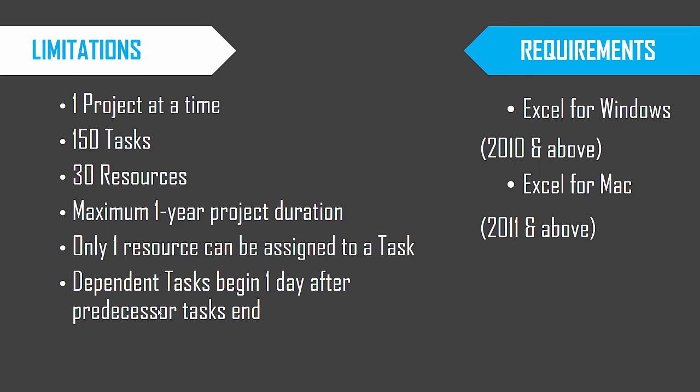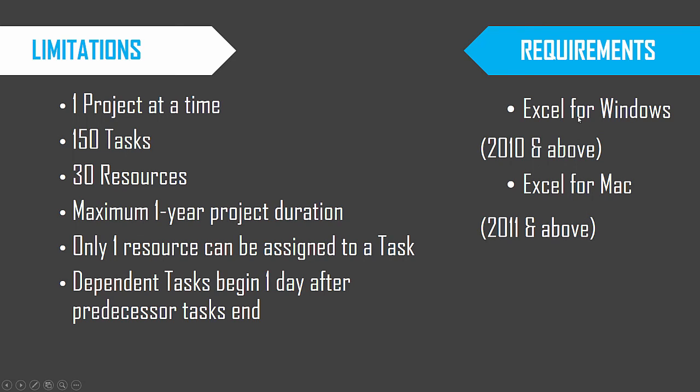So limitations, it can manage only, plan and manage one project at a time for 150 tasks and 30 resources. And maximum duration of the project can be one year, only one resource can be assigned to each task. And the dependent tasks can begin only the day after the predecessor task and the template can handle two predecessors per task. The requirements are Excel for Windows 2010 and above, Excel for Mac 2011 or above. Those will be compatible with this template.